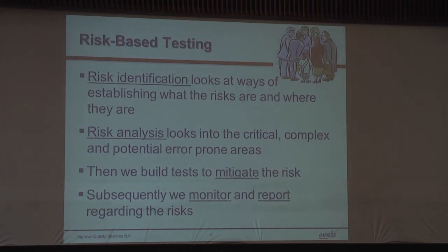By the way, notice I'm saying then we analyze them. In many projects I've been involved in, they're trying to do the same thing in one step. So someone says, this is a risk. And someone else says, no, it's not. That actually means that person is able, in 2 seconds, to do a full analysis. You can't. First, build a list. And in this list, everything still is okay. These are all the possible risks. Then, in a structured way, you go to the next step. Are they really risks? How important are they? Are they big risks? What's the chances?